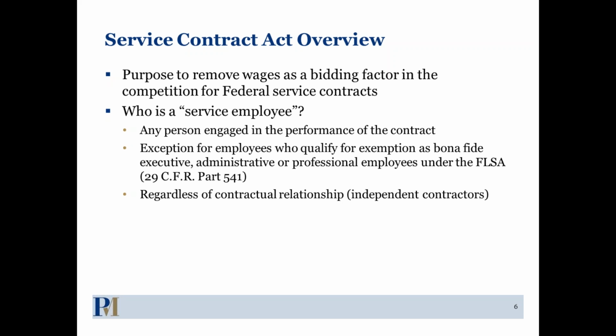We're going to go into Davis-Bacon, but one thing that's important to note is that it is not uncommon for a contract to include both the Davis-Bacon Act and the Service Contract Act, particularly on IDIQ contracts. If your task orders don't break out which one applies, it essentially means that you have to decide. And that goes to what I like to think of, in both SCA and DBA, as the contracting officer's responsibilities and your responsibilities if you're a contractor.